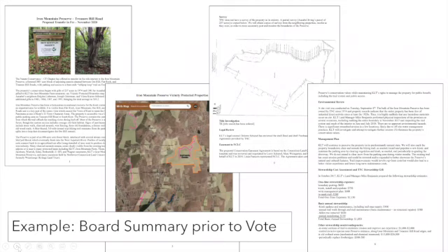The Land Protection Committee, or the persons that are responsible for preparing the project, should provide the board with sufficient information about the project, including a description of the conservation values and why they meet the organization's project selection criteria, maps, photos of the property, and information about the project structure and its costs, as well as the results of title investigation and other due diligence.